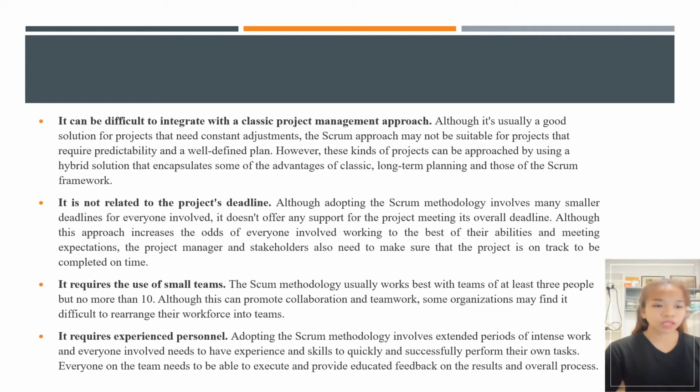Next is, it requires the use of small teams. The Scrum methodology usually works best with teams of at least 3 people but no more than 10. Although this can promote collaboration and teamwork, some organizations may find it difficult to rearrange their workforce into teams.